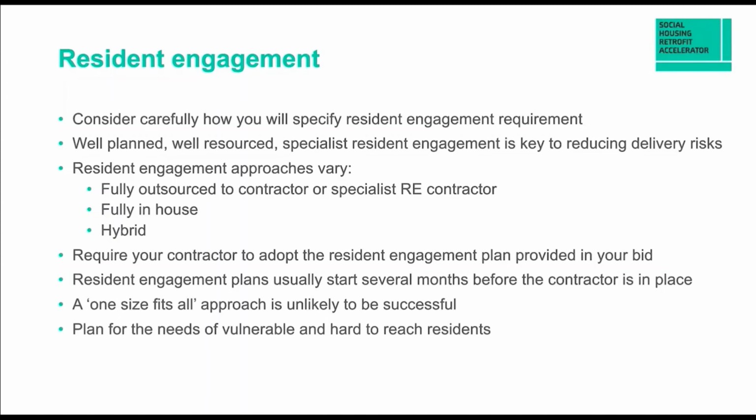Often contractors will have this RLO capacity that they use themselves because they need to liaise with residents to gain entry to properties, to understand when people are going to be around, any restrictions or limitations on access. If people are vulnerable, what other considerations are there? So there's often within contractors this role already, because it helped them deliver the work. When you're procuring contractors, it will be wise to require this within your specification for the retrofit contractors that you want to engage to do the work.